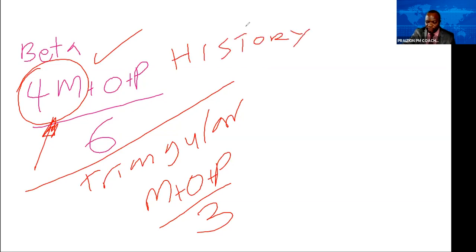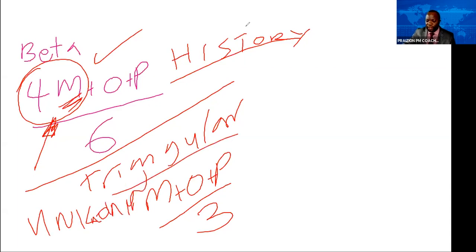Where you do not have the history to make the most likely weighted more than the others, you got to go with triangular. So this is where you have unknowns that you've never encountered. See? So triangular is used for new technology. All right? Keep that in mind, because that could be a trick question. You typically get the question that would say, you've been called upon to do this, this, this. It's new. It's never been done before. No one's ever been to these regions. You don't know what you're up against. It's going to be triangular.